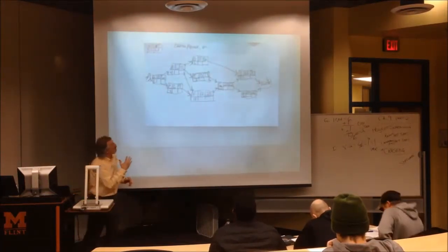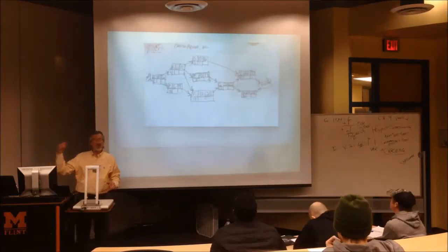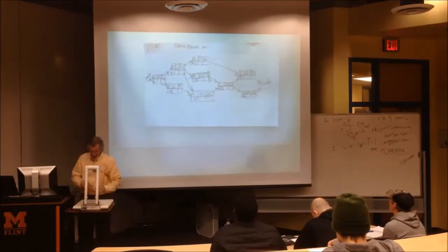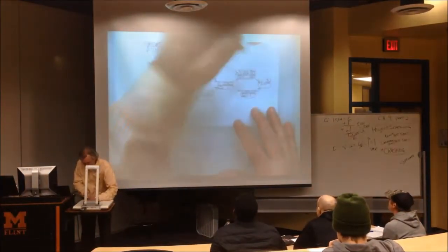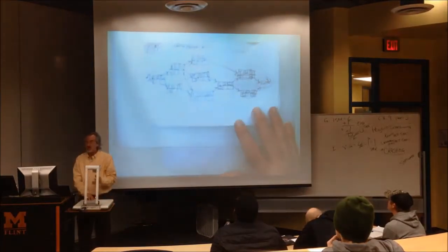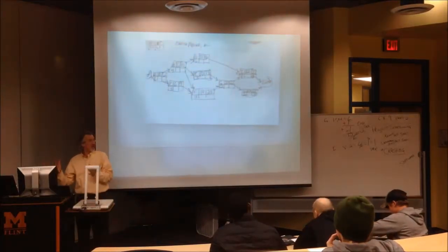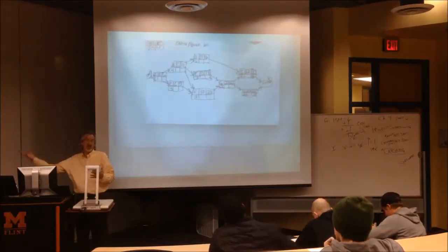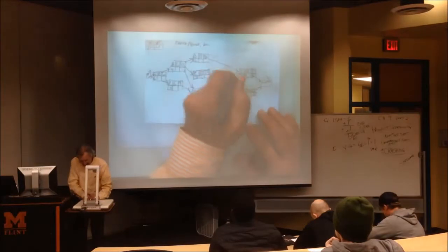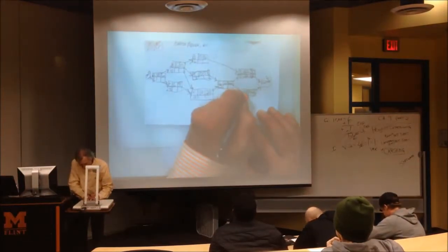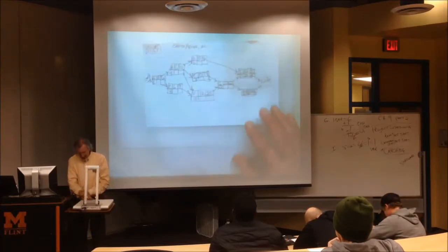Go to the bottom right-hand corner, look at the finish. The ones that are coming directly from the finish can finish as late as the whole project. So we have a 30 in the bottom right-hand corner in I, and a 30 in H, because they're both going to the end, and they both can finish on that last day, because they don't precede another activity. So now on I, you subtract 8, we're at 22. On H, you subtract 6, that puts us at 24.